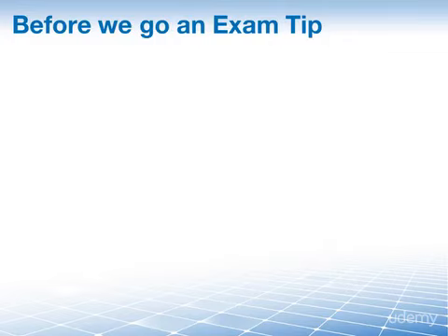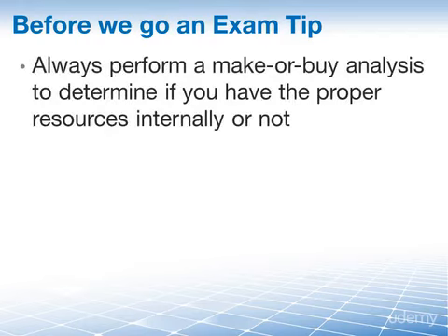But before we go, here is a quick PMP exam tip for you with regards to certain assumptions that you can make when answering PMP exam sample questions. First of all, as project managers, we should always perform a make or buy analysis to determine if we actually need to go outside of our project's organization. So anything that we need to deliver on our project, we have to think it through and say, are we going to make this or are we going to buy this? The make or buy decision is mandatory.